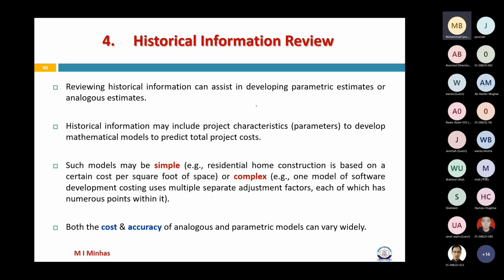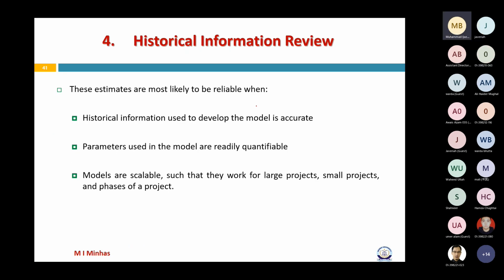Yeah, I will calculate what per square cost is coming with me and what was the per square cost of a project that has recently been completed. So I would like to know what the differences are. Why am I costing so high? If that is the case, you may need to go back to your estimate cost process, as there might be something wrong in the estimation, correct? Right. Okay, and historical information. We have already covered these models earlier.